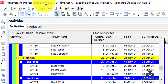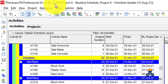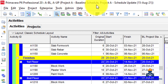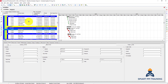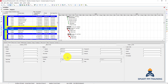You can select both projects and right-click Open. You can see there is a comma to separate the files — a project ID with a comma and brackets, the description of the first project, comma, description of the second project. You can also do the export and have two projects in one file. You can have more than two — five or ten projects in one file.